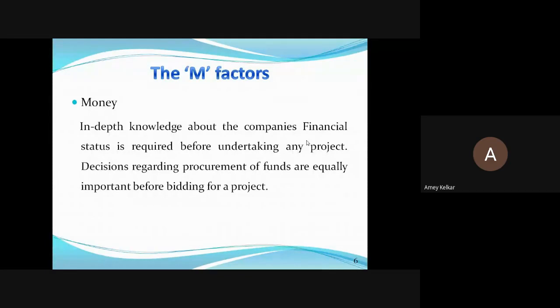The funds should be available, because many times what happens is we go ahead with the project and suddenly a time comes where we have a cash crunch. We don't have the required finances, and our project work gets delayed or withheld, and we are not able to make the payments to the laborers or to the contractors, or we don't have money to get the materials. Right, Rohan? This is what you wanted to tell. Yes, sir. So that's the money factor, which will be very, very important when you plan a project.